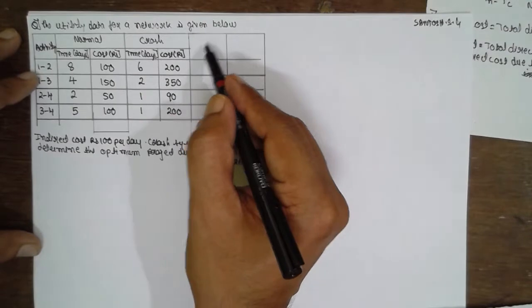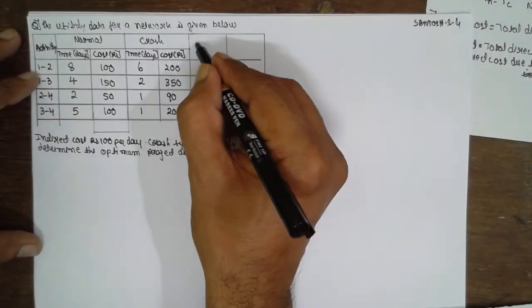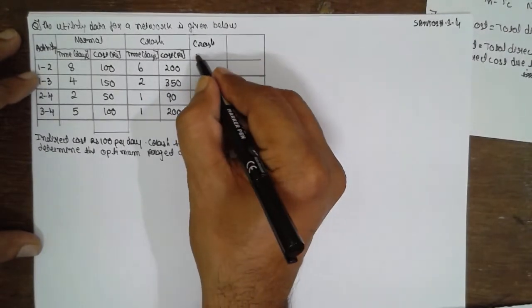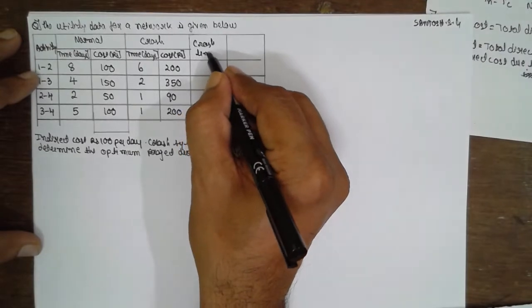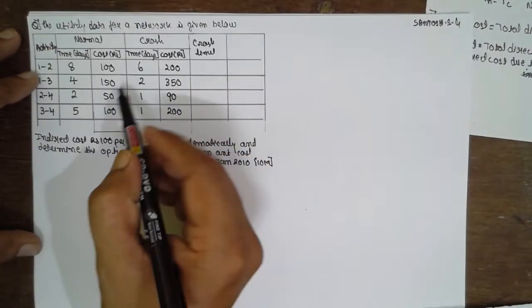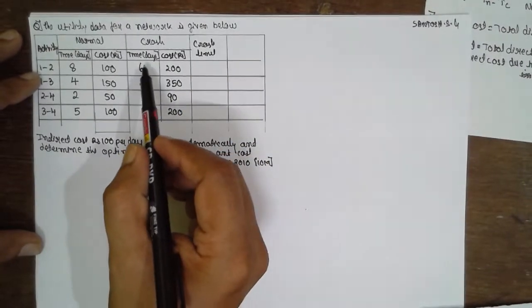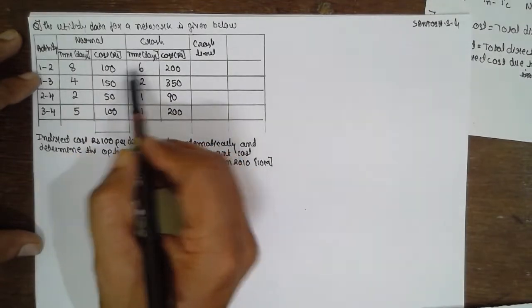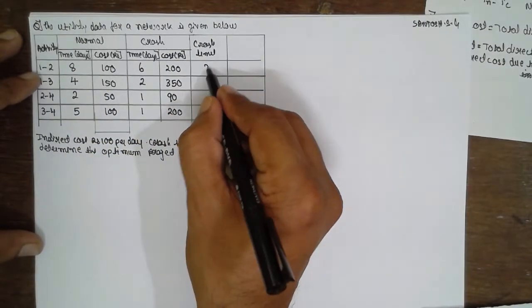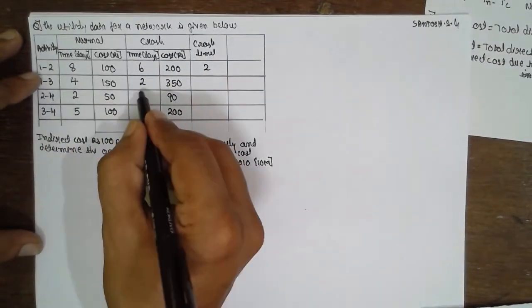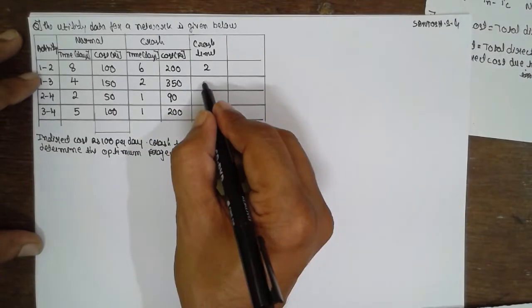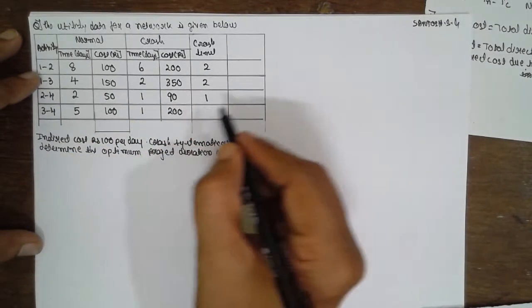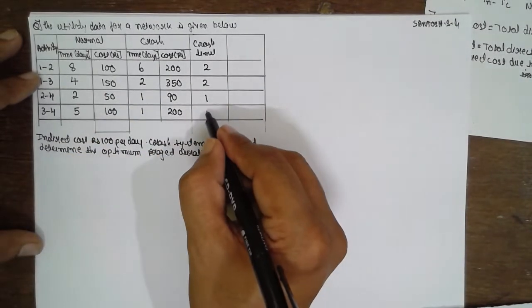Now we are going to find out the crush limit. The crush limit is nothing but the difference between normal time and the crash time. 8 minus 6 is 2, 4 minus 2 is 2, 2 minus 1 is 1, 5 minus 1 is 4.